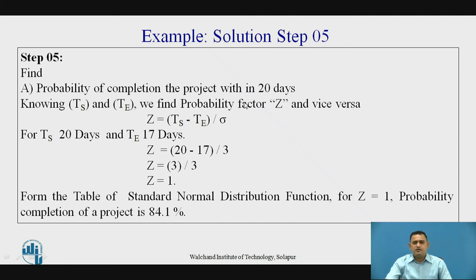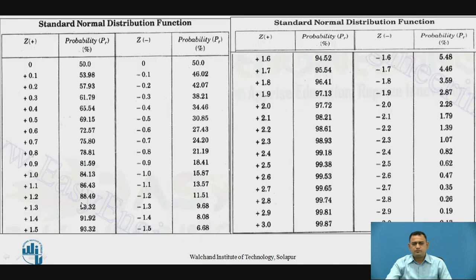Ts is 20 days (scheduled completion time) and Te is 17 days (expected completion time). So Z = (20 - 17) / 3 = 1. The normal deviate Z equals 1. Using the standard normal distribution table, we look up Z = 1 and find the probability completion is 84.13 percent. This is how we define the probability completion time of the project.